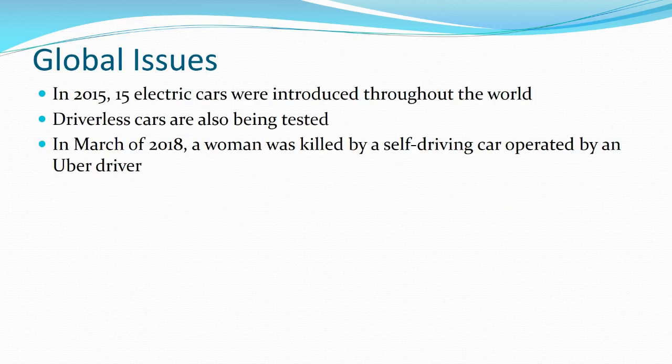Global issues in quality management now include automation and driverless cars. In 2018, a self-driving car hit and killed somebody. There's argument about whether that was a quality problem — did the system do what it was supposed to do? Or was it bad system design, because the system had never been designed to accommodate pedestrians? In that regard, it may not have been a quality issue — the system was operating as it was supposed to — but perhaps the initial requirements were not well thought out in the first place.